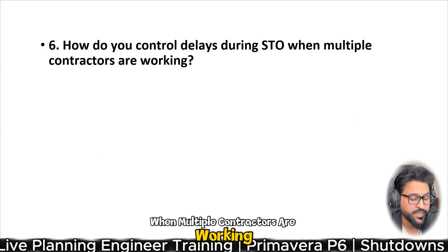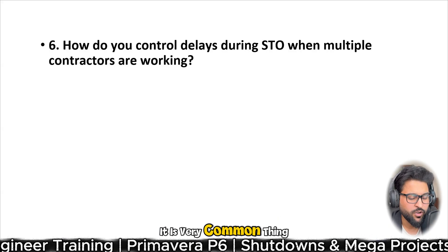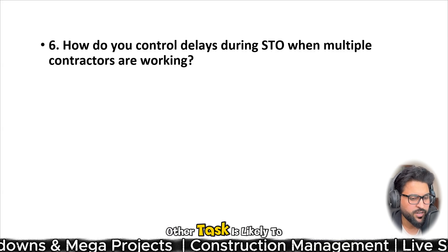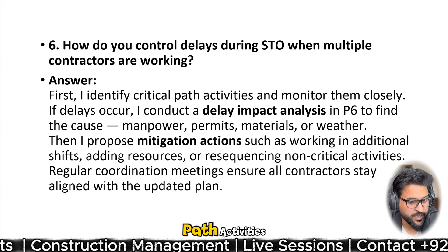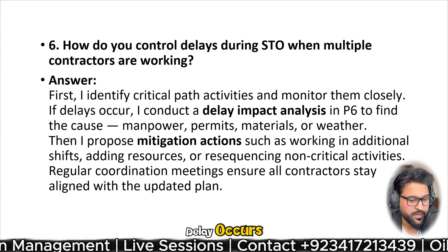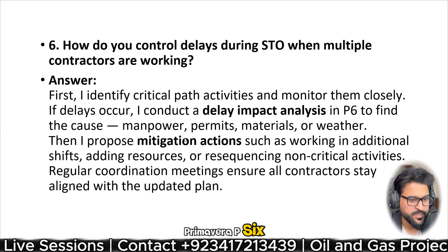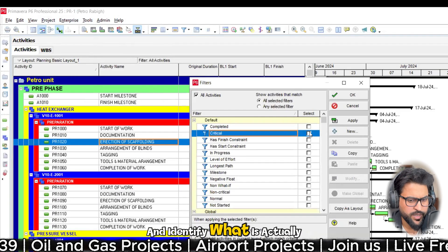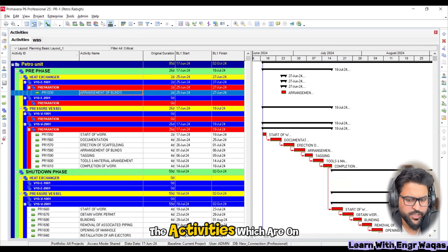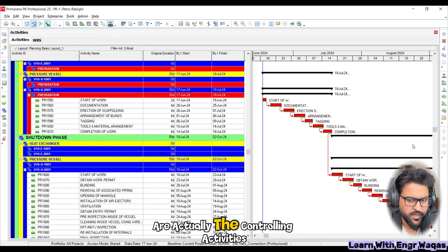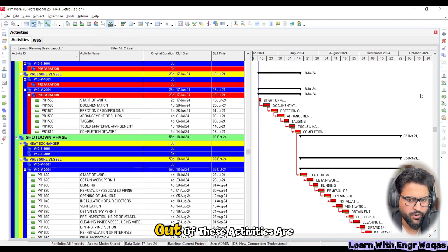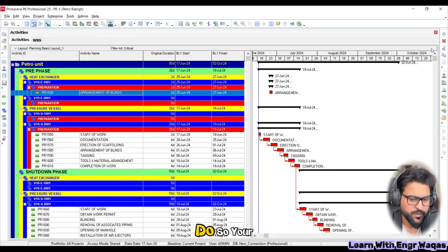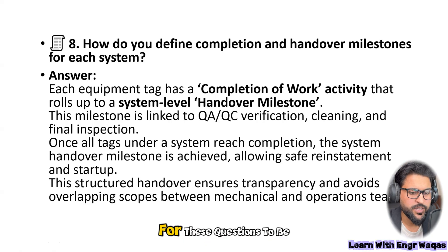How do you control delays during a shutdown when multiple contractors are working? In project scheduling it is common — tasks depend on each other, and if one task delays another is likely to delay too. First, I identify critical path activities and monitor them closely. In Primavera P6 I go into filters and identify which activities are on the critical path, because those are the controlling activities. If any of them delays, the project will definitely delay.